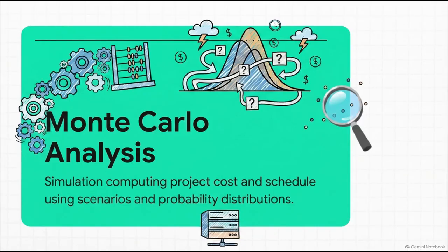Finally, when you're dealing with extreme schedule or cost uncertainty, Monte Carlo analysis is the key simulation technique you need to know. This is where a computer rapidly calculates the probable total costs and completion dates across hundreds or even thousands of different what-if scenarios. It gives you a highly realistic probability curve for your project's success.